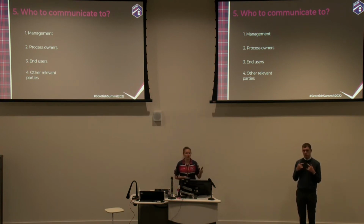We had people involved from the very first step. We had them involved in the process of figuring out how we want the system to look. We had them involved when we did the technical testing. We had user testing after each time. And when we went live, people were used to using the system already. They had been there, they had seen everything, they had gone through the part of what does this button do. So it wasn't that new to them, and it wasn't a shock when they got there. So we got very positive feedback when we went live, because there was nothing that they hadn't seen before.